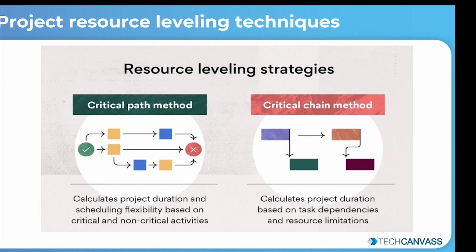For example, to publish a piece of content on time, the manager determines the resources needed, maybe a writer, an editor, a designer, and a developer. They set a buffer of 5 days in case there are delays between content or design review. The critical chain method aims for realistic estimates of project duration and resources so that projects finish on time without overextending resources.